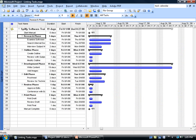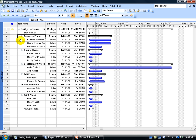Linking tasks means that you want to take one task and create a relationship with another. For example, I've got my examine software and search internal documents. The default or the main purpose of creating relationships between tasks is, for example, before I can start search internal documents as tasks, its predecessor must be completed or finished.